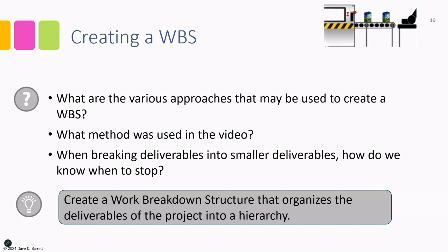You can use a similar project's WBS as a starting point. If an organization does a similar type of project over and over, the previous project's WBS can be used as a starting point and then modified. And sometimes organizations will have a standard WBS for all of their projects. In the video, we did see it was more resembling a top down.